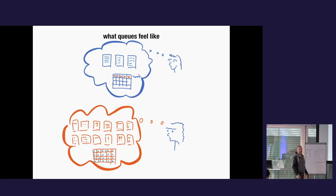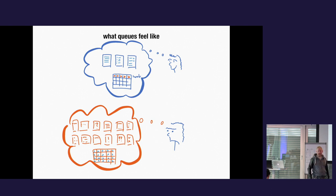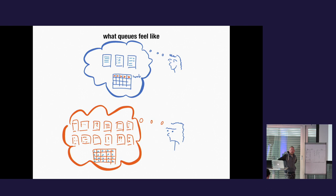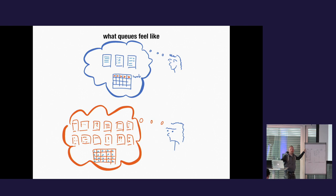This is actually what they feel like. Have you ever been overworked? You are most probably not overworked because of the work you are currently doing, but because of what still sits in your backlog and needs to be done. This is a queue, and it's most annoying. You know where the Kanban system comes from originally — the Toyota production system. They realized that inventory is expensive. Having things on the shelf with no good value is expensive. And so are queues. This is your inventory — you just don't put any price tag on it.